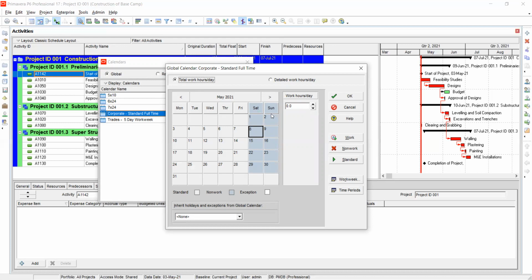Do you know why? Because not working may not be only about equipment. Now you also have labor, so you may find that maybe the machine has stopped, but your labor is still on the way going back to the office, and all that time is counted as them still being on work. They are moving from one point to another. If you're working on a road and they are moving to bridges that are 100 kilometers away, you cannot say that while they are still on the way, it is non-working time. No, it is working time because they are moving to go to the work. It is part of the work.